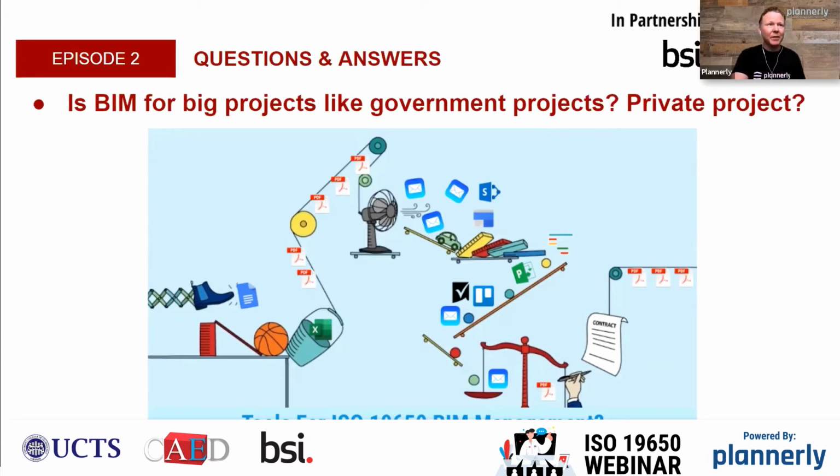That ties in with a Q&A, a question actually related to Plannerly, but it's really any definition of scope in a BIM or an information management project where you're managing that type of information. How do you define it? And when you talk about ISO 19650, you really have to have a clear purpose before you define any scope. There's a really, really solid message from that. What does the owner really care about to be able to run their business better, and have a clear purpose before you start creating models? Because you might be creating a lot of content, a lot of elements in the model that there's no customer for, and there's no benefit for that. And if you don't have a customer for your work, then you're not really doing any work. You're just wasting your time.